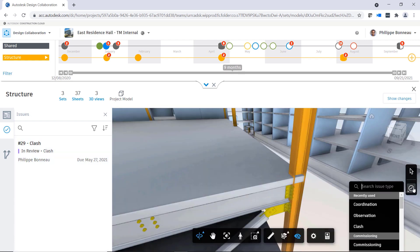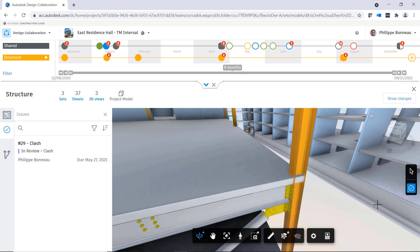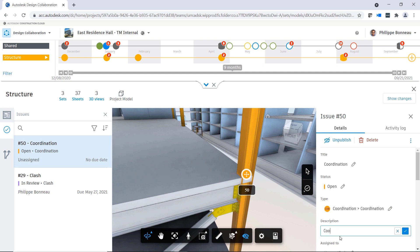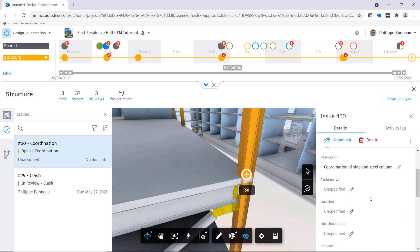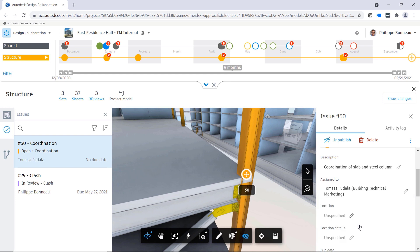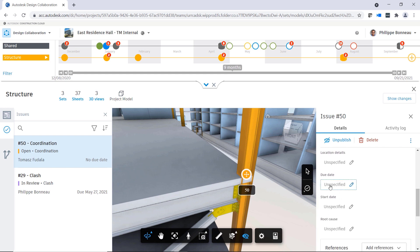While exploring a set, you can also create new issues. To create a new issue, simply click on the Issues icon on the right-hand side of the viewer, define the issue type, and add any necessary information, such as location and due date.